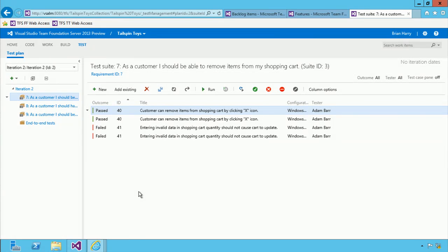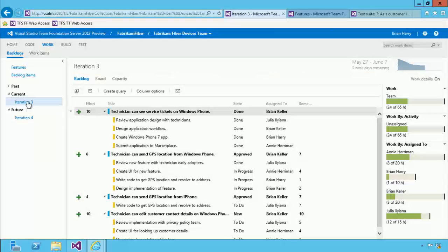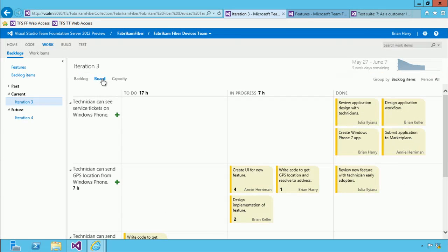And so, for example, for those of you that missed the foundational session on Monday, we showed how these backlogs can be managed, and you can start to plan and break down work across your entire team, and you can drop into a particular iteration, and you can then decompose that work into individual tasks, and then you can switch over to your modern-day implementation of Post-it notes on a whiteboard, and you can kind of watch this move from left to right.